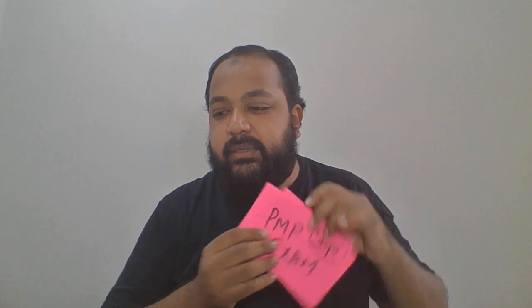On your PMP examination, two concepts that will be tested are, first, what is scope creep. Scope creep is when you agreed to 60 requirements and now the 61st requirement comes and someone says a very minor thing, can you just do it? Your developer might do it. Or somebody else, like the customer, asks your developer directly, can you do this? He's doing this and you're not aware of it. So you're creeping into the scope. This is called scope creep. When the customer asks you to do something which is not part of the requirement and you keep doing it, it's called scope creep. C-R-E-E-P, creep.